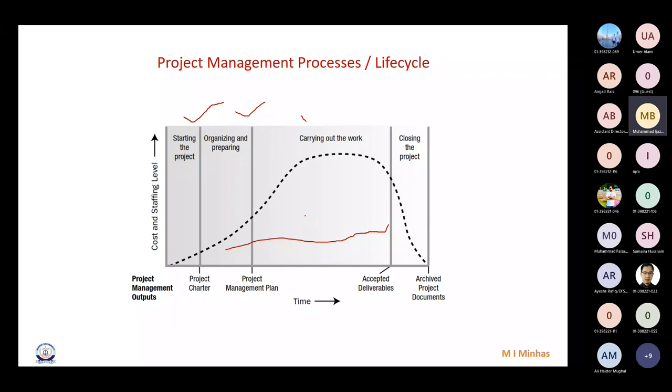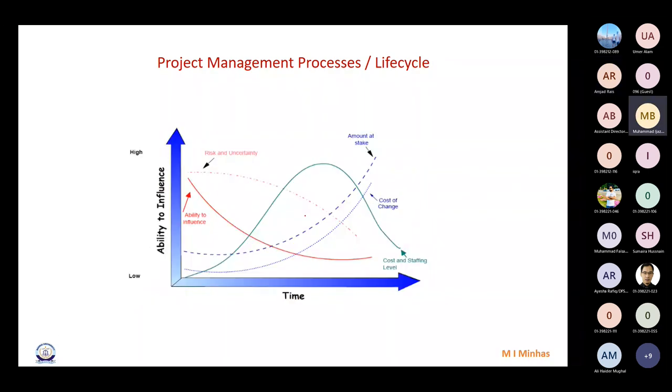Yes. Okay. So now these slides just tell you one thing: the uncertainty and risk is high in the beginning, but this reduces with the passage of time. But the amount at stake is very low in the beginning, and very high once you have almost developed your project. For example, in your second semester, God forbid, will you think of quitting your degree in the third semester? You had spent a lot of time. But in the first few weeks, obviously, the effort that you have put in is very little, so you can take that decision.